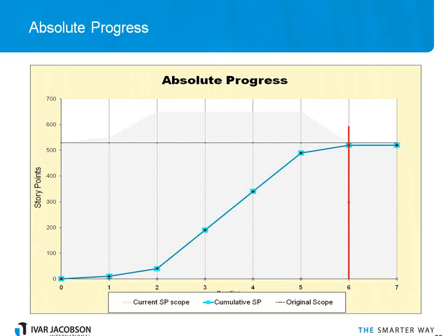Like I say, if this was a burn down chart, we would set our initial target. So here we had 530 or something story points was what we said we'd do at the beginning of the project. And if we had a burn down, our target would be to hit 0. And then if our scope increased, as the grey line shows some scope increase there across the middle iteration, some more requirements were added on in iteration number 2, upping the number of story points. That would lead the burn down to start having a target underneath.